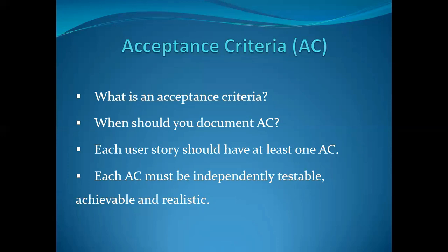And when should you document your acceptance criteria? I always say document your acceptance criteria before they finish development of that product. Finalizing your requirements is the key, and your user stories also, but you may have the time to write it alongside your requirements, your user stories and your process map.